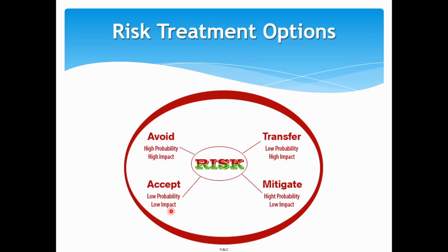Sometimes there are low probability and very low level risks, and even if that occurred, it is a very low financial impact to us. Then of course those risks you might accept as a project manager or as the stakeholders. If it happens, we bear that cost. If that cost increases, we bear that cost. Just about a $100 cost impact to the entire costing of the project. So let it go. Don't waste your time controlling that.